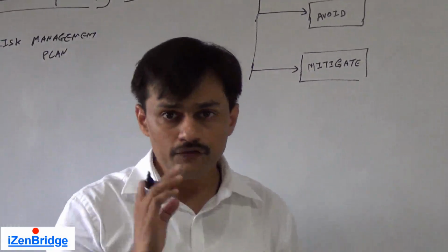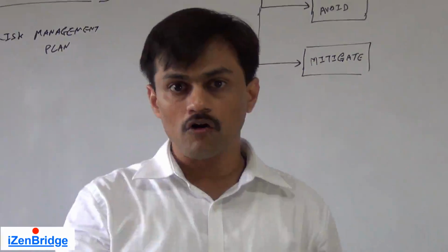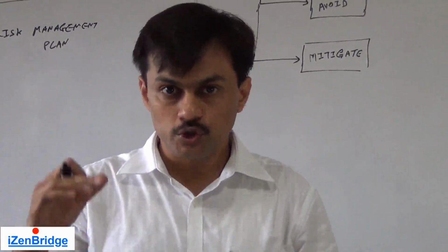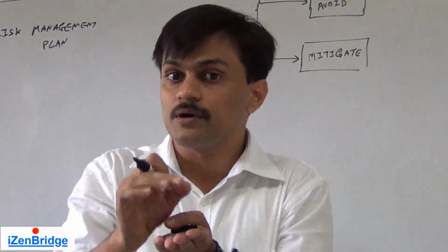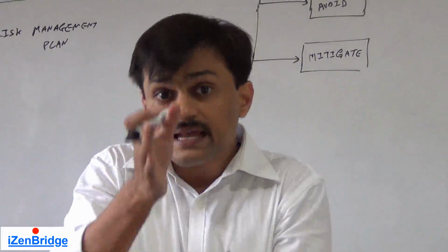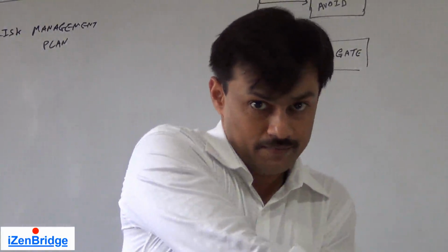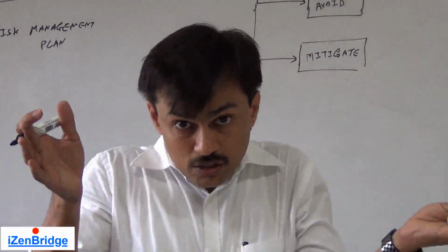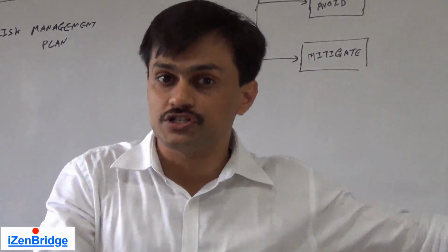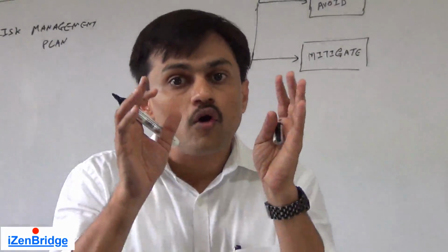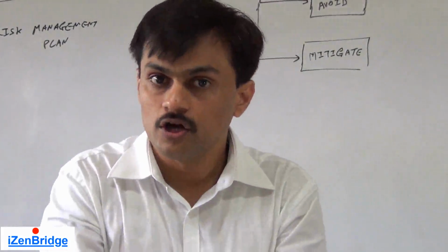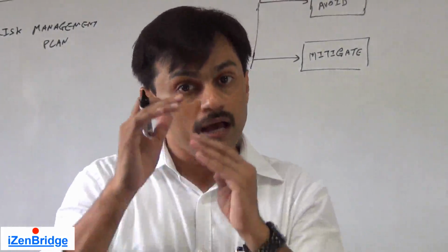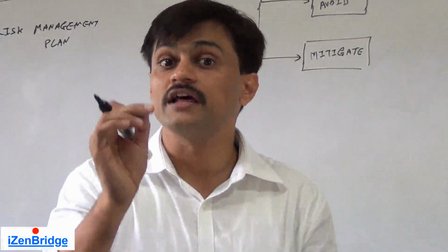For example, if you have a risk of a particular vendor, you are talking about how this vendor may not deliver the given deliverable on date, and this can impact your end timeline. Now this is a risk. You may pick a mitigation strategy, like putting a penalty clause in a contract with that particular vendor to ensure that he delivers on a given date.